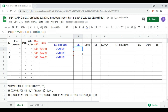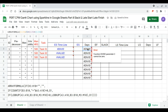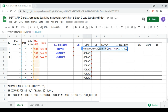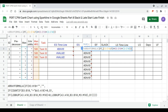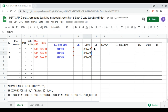Now we can drag this formula downwards. Next we continue with the number of days, which is the number of man-hours divided by the quantity eight, times the number of shifts, times the number of men. We correct this so that if man-hours is empty then it's empty, otherwise calculate.